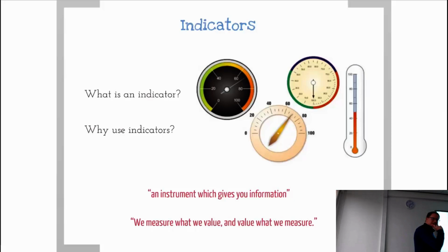Yeah. What is the indicator maybe on project level, or what could we have there? Do we use indicators at project level? Yeah. Earned value, as you mentioned. Yeah, earned value could be one. And what do we look at? We compare the economic performance against the plan. Right. So this could be based on the cost, so how much we have spent against activity of value that has already been delivered in packages.